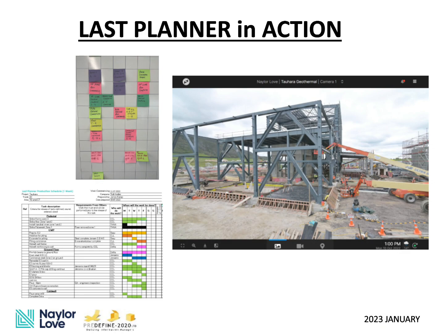As we observed the site manager applying Last Planner principles to the project and phase scheduling and look-ahead planning, we noticed two components as good prospects for visualizing. Coloring of tasks. The post-it notes used to represent trades and sub-trades have bright colors that through the project relevant groups get associated with. Using these colors and applying them to model elements is a good way to easily navigate even very complex models as well as clarify scope between trades.